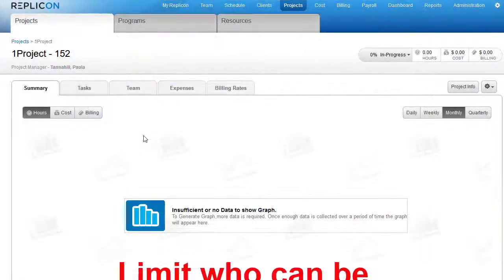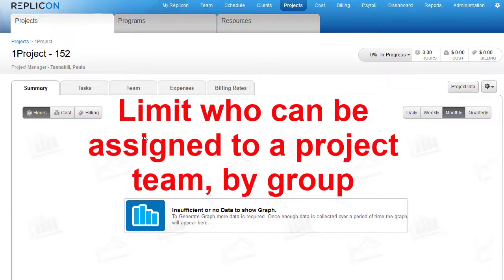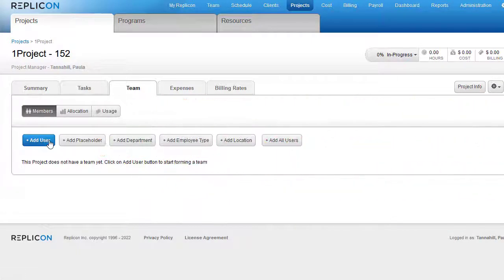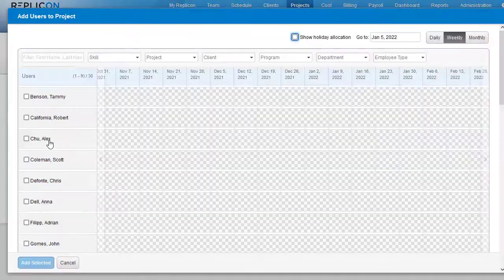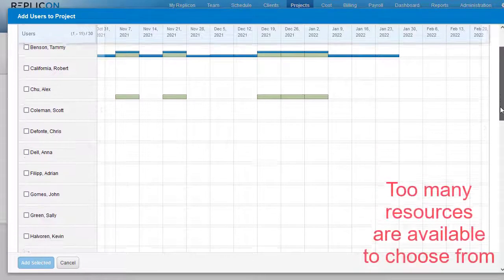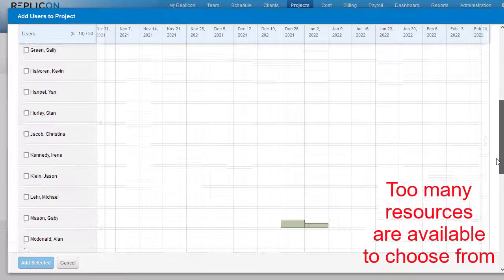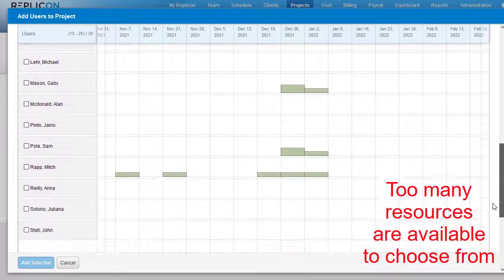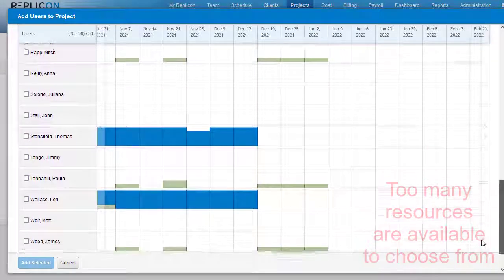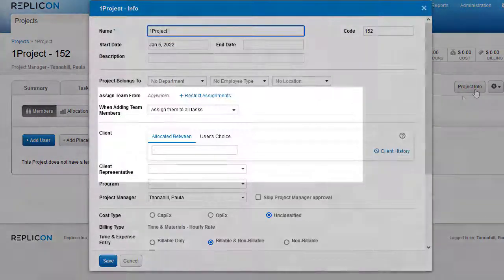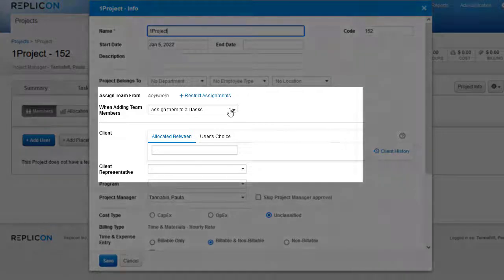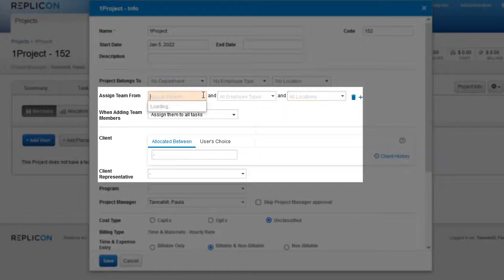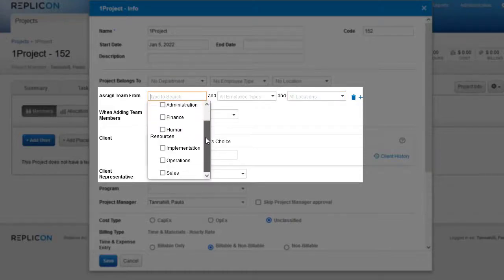If you have a lot of resources, it can be hard for project managers to find the ones they want to assign to a project. With this feature, project managers can now limit which resources can be assigned to a project by choosing which groups, like locations or divisions, they can select from. Then, only members of those groups will be available when using the Team tab to assign resources to the project.